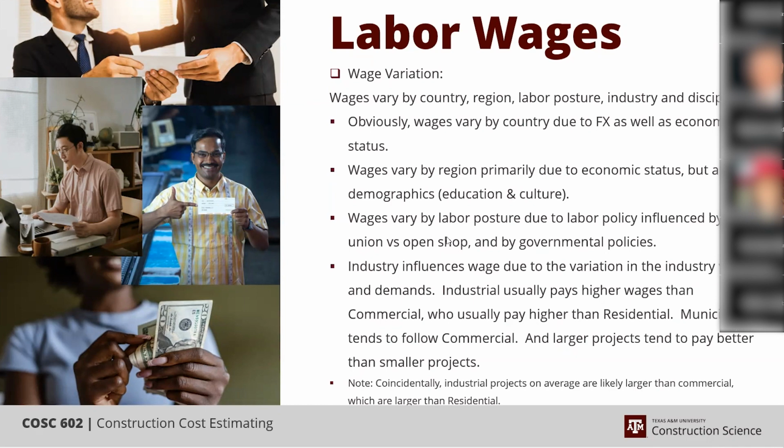and also what industry, because just on average, industrial craft earn more than commercial craft, who in the commercial earn more than residential. That's not always true, but on average, I think you'll find that that's true. And also, the bigger the job, the more it tends to pay. And the smaller the job, the less it tends to pay.